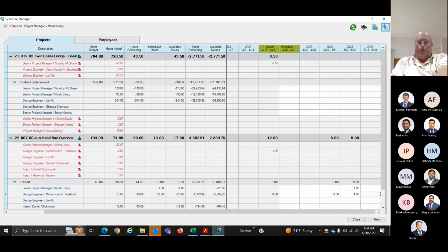And so I have $1,200 and I have 1 hour left. Well, then that means I have $1,200. I don't really care what the hour says. But if Tim's writing the report, I don't have 13 hours, I have less. So that allows you to watch that game and you kind of understand how the hours are affecting you in real terms. Does that make sense? Got it. Thank you.